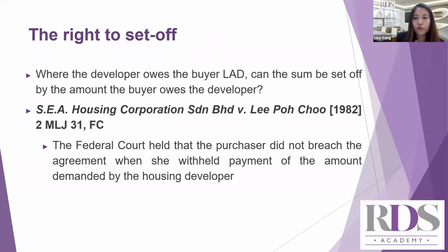Next, on the issue of the right to set off, where the developer owes the buyer LAD, can the sum be set off by the amount the buyer owes the developer? In the case of SEA Housing Corporation Sdn Bhd against Lee Po Chu, the Federal Court held that the purchaser withheld payment of the amount demanded by the housing developer by way of set-off against the balance of the purchase price, the LAD, which is due to the purchaser.